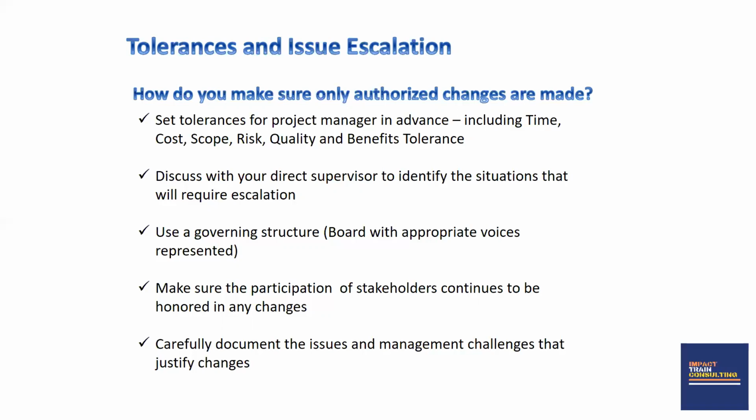Now, we are saying that it is important that you go beyond certain tolerances for costs and expenses. You need to set tolerances for time, for scope, for risks, for quality, and the benefits. So whenever you're taking up a new project, you need to meet with your supervisors and ask them, okay, how much can I approve on this project without coming to you? What certain changes can I make on the implementation plan without seeking approval from you?